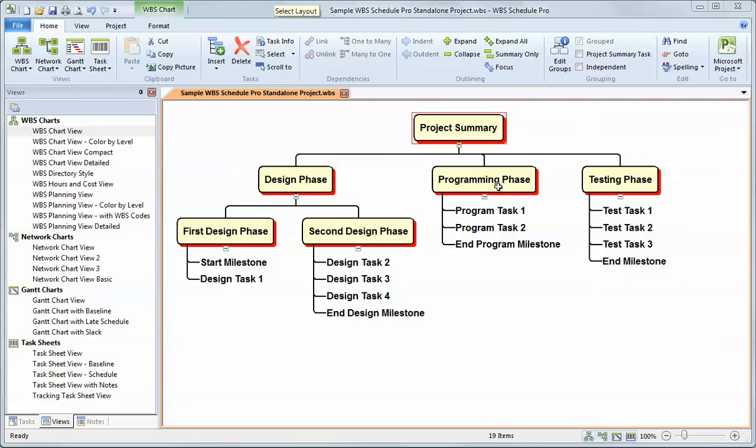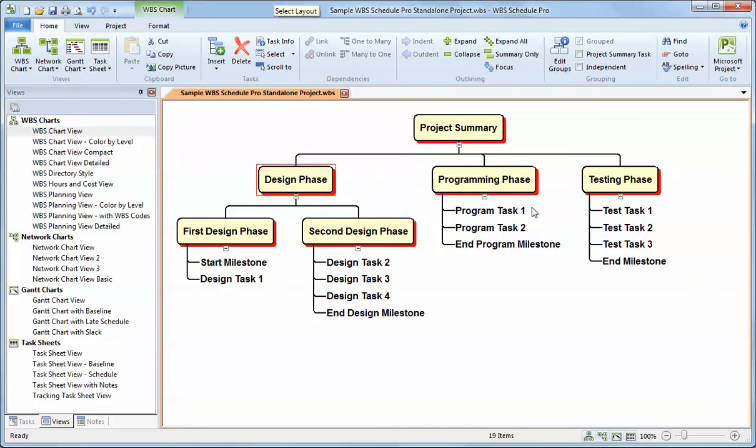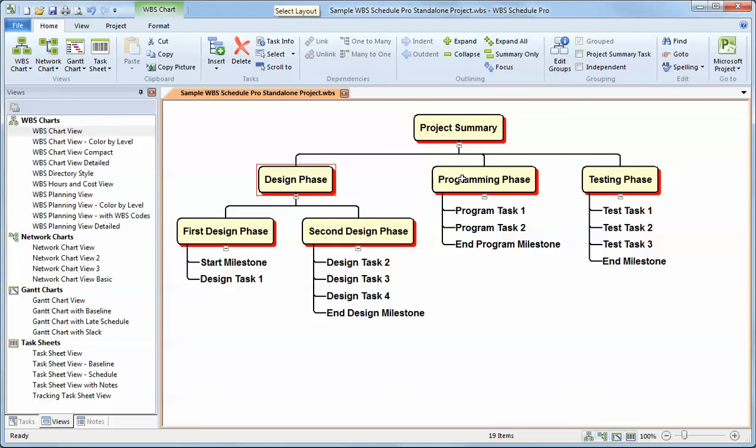It displays summary tasks to represent groups of related tasks. For example, these are summary tasks here, and a summary task is an item in the WBS chart that has subordinate items. It summarizes and rolls up information from the lowest level all the way up to the top.